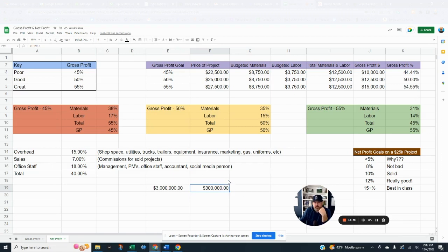You can be making $300,000, right? On $3 million if you make 10%. Now, change this number, because you've increased your prices, you're really charging high end, but you're putting in high-end installs. I mean, it jumps fast, right? It's 150,000 extra in your pocket, and you haven't added anything more. These don't change. That's the nice part about pricing, is pricing goes to the bottom line, right? When you charge 25,000 for something, and you make 50%, you've got 40% overhead, you make 10% net profit.